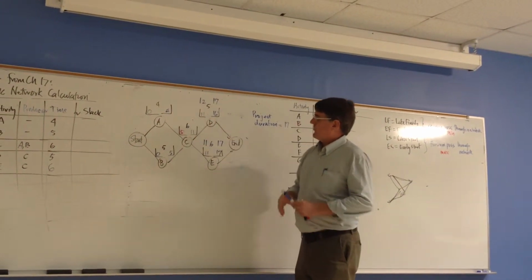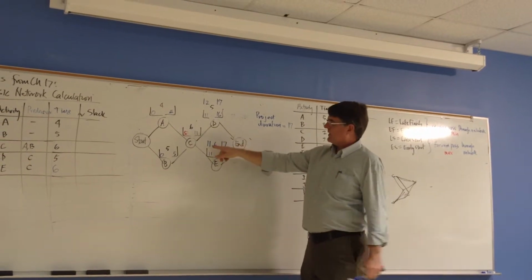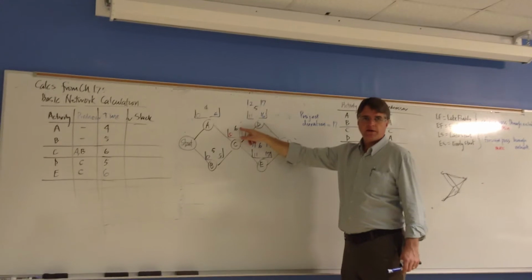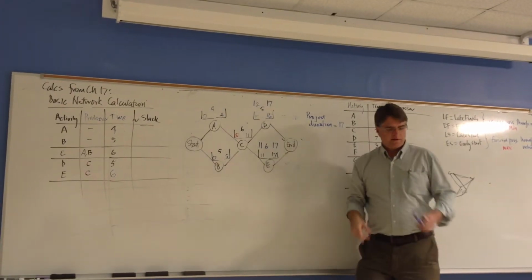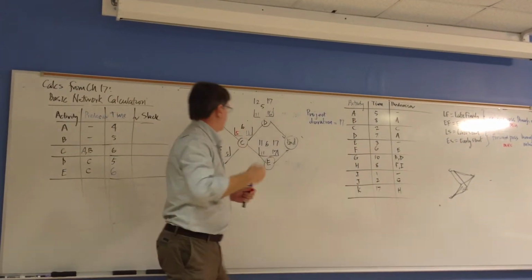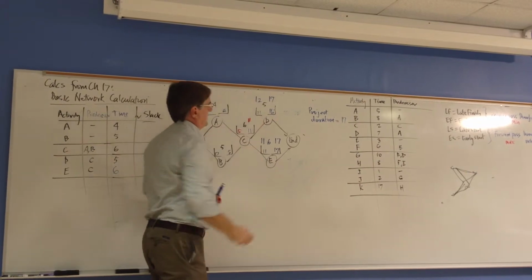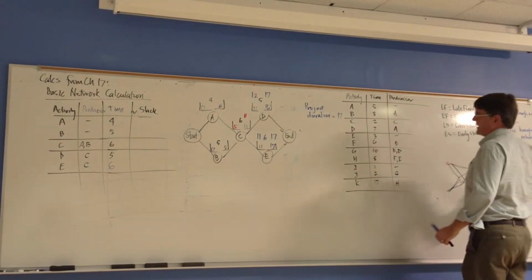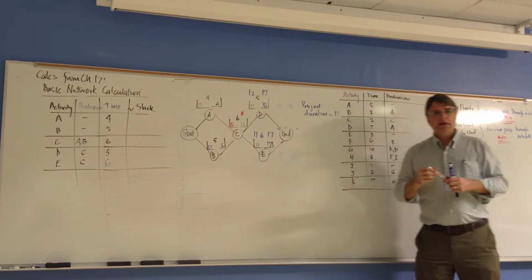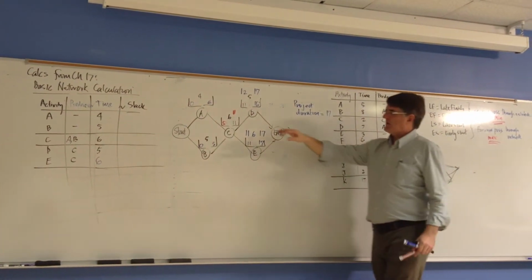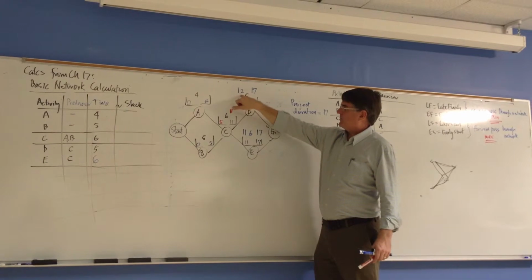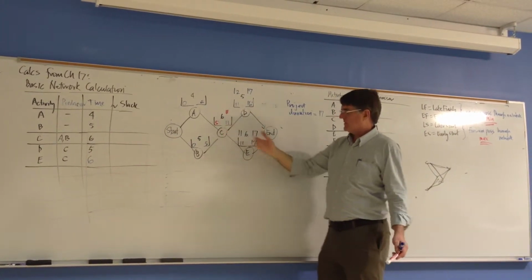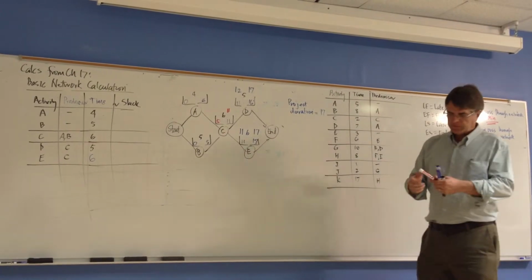So I want this one in red. Now you can see I'm going to get started on this one at time 11 and this one at time 12. So when do I need to get this one done by? 11. Okay. See, I'm getting you a min rule here. I use the max on the way out, but on the way back it's min. But you can reason it for yourself pretty easily. This one wants to start at 12, this one must start at 11, but we've got to get this one done before either of them, so of course it must be done by 11.